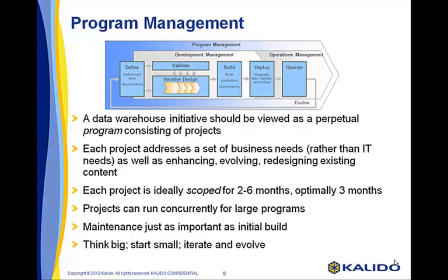When planning projects, there are 3 variables that drive the project: resources, scope, and time. You can only control 2 of these at a time. The traditional approach states that you fix scope and time and you manage your resources. But we all know that this doesn't work when it comes to integrating data. So how about we fix time and resources and manage the scope? This might sound like heresy. However, we know that we are not going to get complete requirements. We also know that these environments are much more prone to change, so we should build a process that accommodates change.